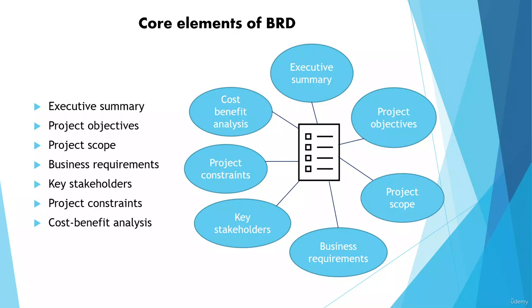on the project. Next comes the business requirements, which is one more core element of BRD. The business requirements are the meat of your BRD template. In this section, you will list the actions required to accomplish your project. Depending on the project complexity, this list may be just a few items or it may be extensive. In addition to listing your requirements and describing them, rank them by priority and assign each item a level of importance based on their criticality. This will help others understand which requirements they need to complete first.